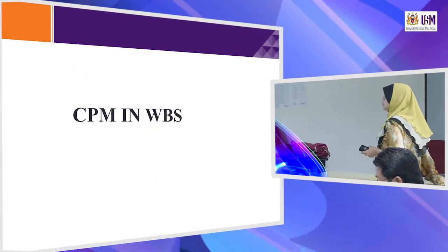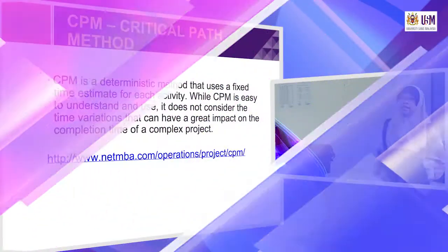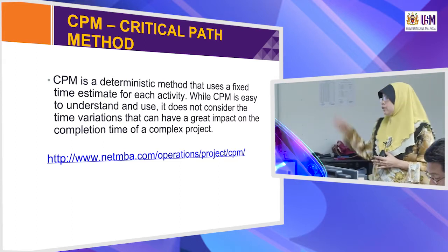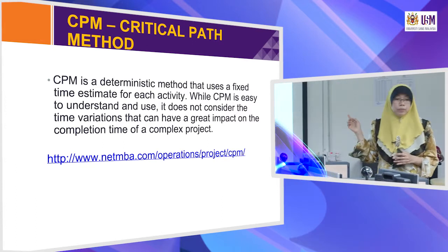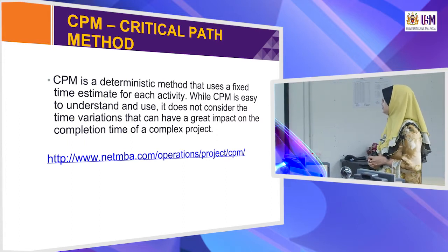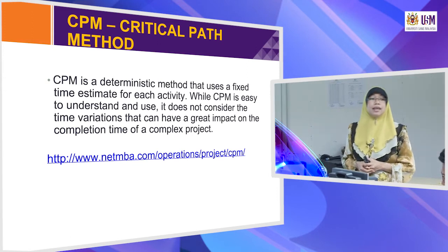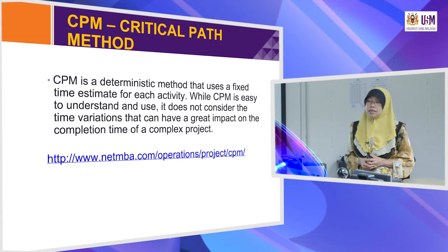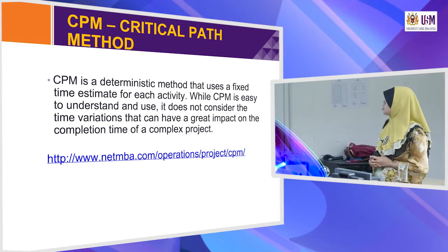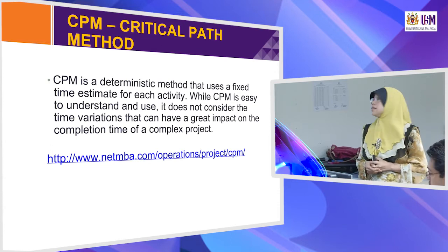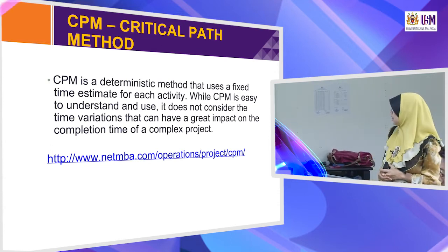Okay, CPM in WBS. What is CPM? CPM is the critical path method. You can refer to the website there, and you can download this PowerPoint in the e-learning. CPM is a deterministic method that uses a fixed time estimate for each activity. While CPM is really easy to understand and use, it does not consider time variation, which can have a great impact on the completion time of a complex project. So the time is fixed.